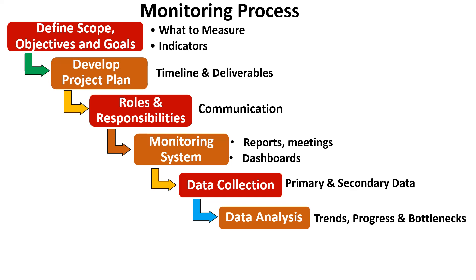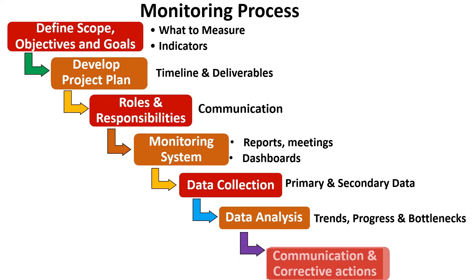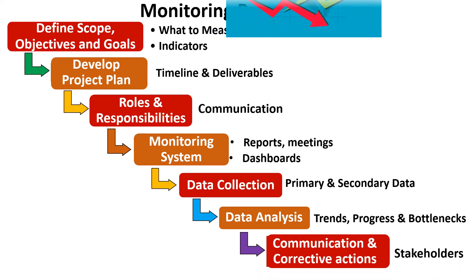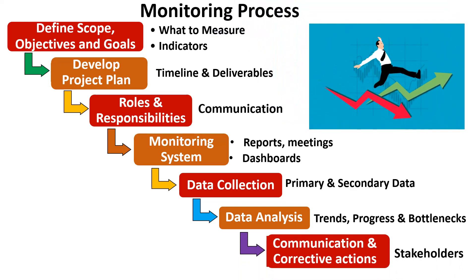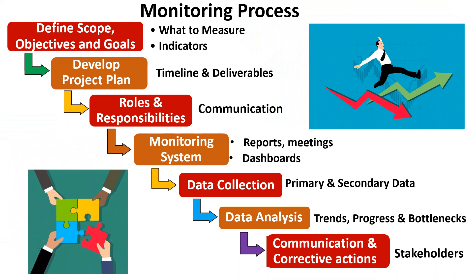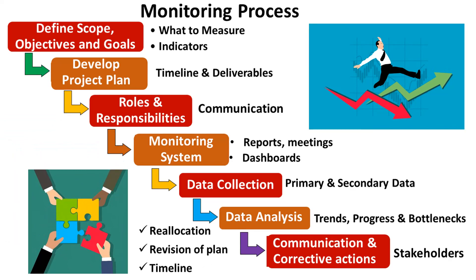Ultimately, based on the analysis, we need to communicate the progress of the project to stakeholders including team members. We also have to take corrective actions if the project is not progressing well. Corrective actions may include reallocation of resources, revising the project plan, adjusting the timelines and correcting other bottlenecks. This should help get the project back on track.